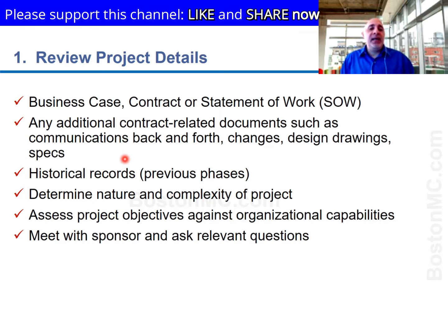If this is a second phase of something that is lengthy, then understand what happened in the first phase. Review records of the previous phases, and determine if this is a complex, complicated project. What constitutes complexity really is the number of people involved and the nature of the work itself. Is it new technology? Is it something we haven't done? Does it have too many unknowns?